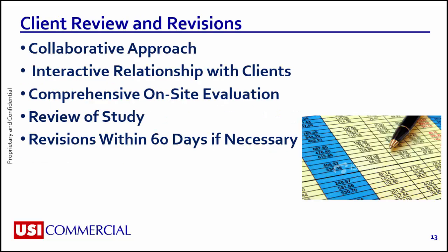The most successful studies are those which are done in a closely interactive relationship with the client and its management professionals. A comprehensive on-site evaluation by an experienced project manager and on-site reserve analyst will be conducted, and the resulting data compiled and analyzed. At that time, a preliminary report will be submitted to the property manager for review and comment. Based on their input, the report will be revised if necessary. It should be noted that we request revisions to be submitted within 60 days of the date of the preliminary report, and all changes should be performed at the same time to avoid additional charges.